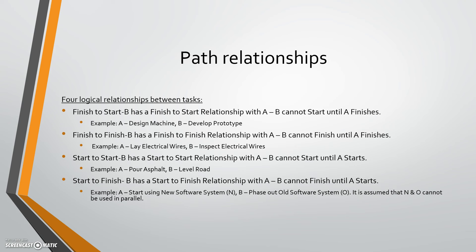Finally, there's start-to-finish — B cannot finish until A starts. For example, A is starting to use the new software system and B is phasing out the old system. You cannot phase out the old system until the new system is implemented, so there's going to be some overlap. When we talk about overlap, there's what they call lag — say in our finish-to-finish example, inspecting the wires may take less time than laying them, but they still must finish at the same time, so there will be a waiting or gap period. That's what they call a lag.